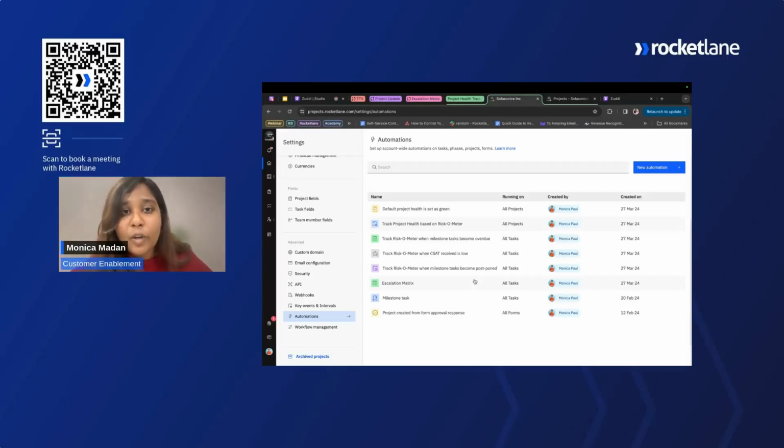And finally, we are going to say, hey, this project health is green if it has risk as 0. This project health is amber if its risk is, let's say, above 5, and the project is on red alert if the risk exceeds 10. This is an outline of how we are going to see risks and project health and how they go hand in hand. So first, we need to determine these risks and project health as fields under your project